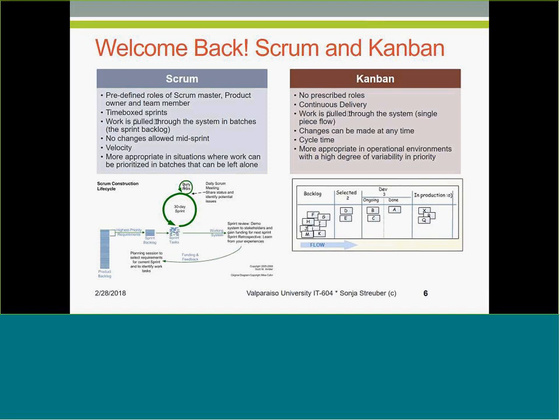And what is blocking me? So then the sprint continues. At the end of the sprint, we have the big sprint review meeting, at which the team demonstrates the outcome from the sprint to the user. The user gets to play with the finished product from this sprint.